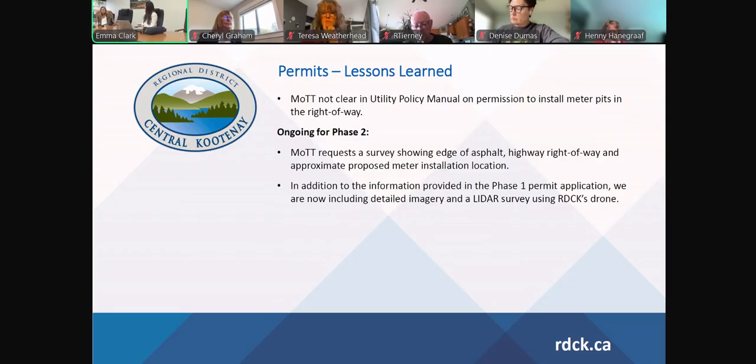And supplemental to that, will we also be noting infrastructure on private property through GIS? That won't be part of it. They're simply interested in us maintaining that distance from the road prism and ditches, etc. If for some reason we're not able to maintain those setbacks, then they'll have a representative come on site and have a look at it.